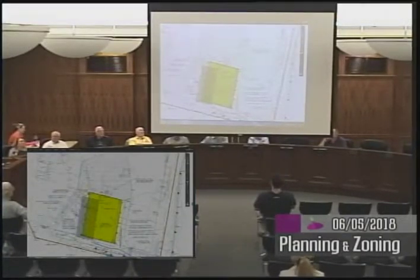We have a certain fixed budget on this project, so once we get some more information on the actual requirements for the structural design for the concrete and work out our site costs, we are going to bid it with the ability to put in a smaller structure if needed, but we wanted to permit for the largest structure. If need be, we may trim 10 feet off the width and/or the length to accommodate our budget. But right now, we're thinking that we do have enough budget to put this size structure in, and that's what we're here tonight for, seeking approval.